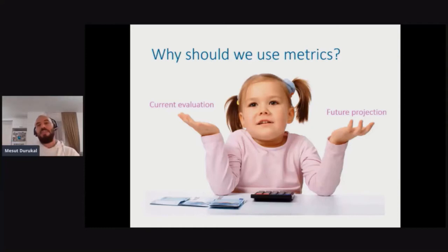And in our projects, it works in a similar way. Let's go with an example. Let's say in the middle of the sprint, at the end of the first week, we completed only 1/3 of the test cases. Then we can assume that in the second half of the sprint, we can complete another 1/3, right? So we will not be fully completing the whole set. So we can take some action items.